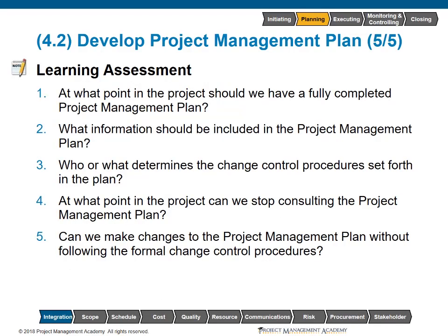Develop project management plan, learning assessment. At what point in the project should we have a fully completed project management plan? The project management plan will be completed when all planning processes are completed. However, it may change later as the project proceeds.